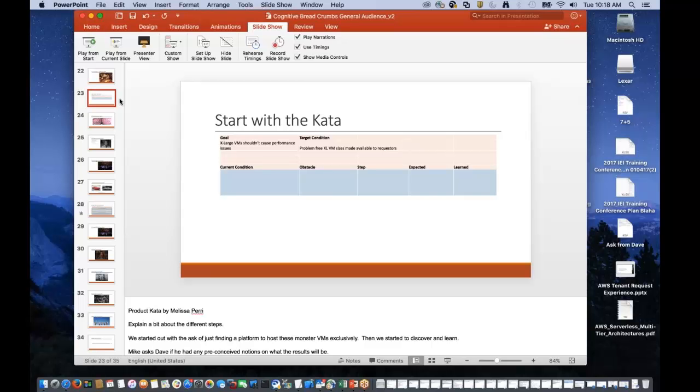And one of the things I recommend, and I've learned over a year of practicing this now, is that if you have daily stand-ups, it's worth adding 15 minutes at the end of your daily stand-up to go through the kata and say, okay, let's talk about what you've learned today and what your next steps are. Getting started is really just a matter of practicing this yourself and finding a coach if you can. Often the learner and the coach can interchange positions. You might have different katas you're working through, and you don't have to be a manager to be a coach. You could also be a learner and have somebody on your team coach you if you want to, right? It's about sharing that learning and helping each other build that discipline. Right.